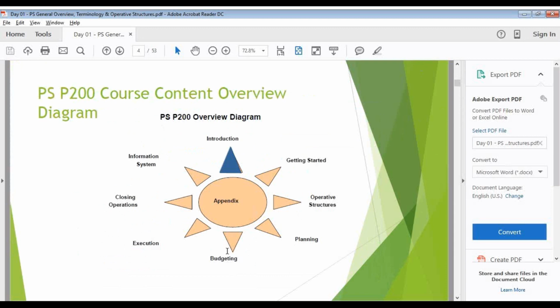Okay. Once the budget has been approved and set, it has to be allocated to the different components in PS, like the WBS. Budgets will not be assigned to activities. Budget will all be assigned to WBS, different levels of WBS. Activities are only cost occurring objects.